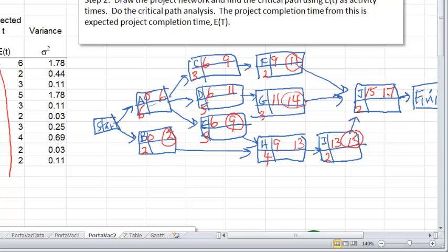Now from this we would say, oh, the total project time is 17 weeks. But it's not exactly 17 weeks, it's basically the expected value, because the times that we are using for the activities were not exact values, they were the expected values. So the total time we get will also be the expected value. So from this number, we would say the expected project time, not the exact project time, is 17 weeks. Okay, now we do the backward pass.